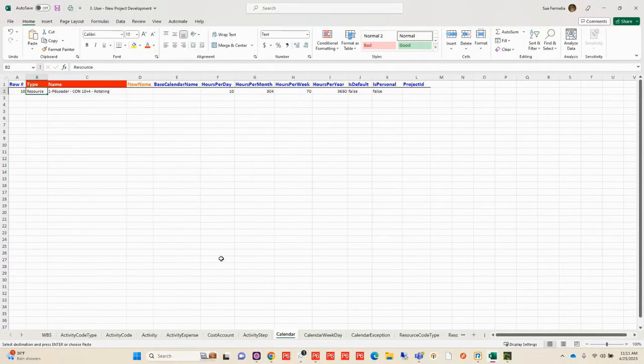I also need a new resource calendar for this particular project. I have some resources that are going to be working a rotating schedule, 10 on and 4 off. If you've ever defined a rotating calendar, you know how it can be fairly difficult. You've got to count out each day, make sure those are the work days, count out those next 4 and say they're non-work. And if you miscount, you basically have to start over because it's really hard to get them all jockeyed around and correct it again.